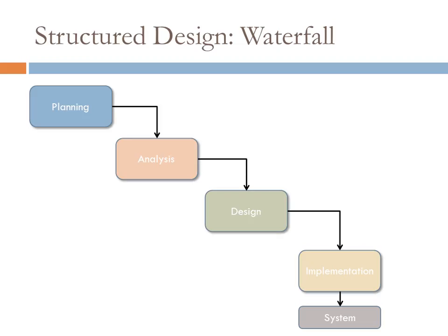And then once we're done with that and move to the analysis phase, we very rarely ever come back to this planning. Right? That's done, it's set in stone, and we move on. And the way that relates then to the project scope, which was mentioned earlier, is that typically they try to keep the project scope very fixed. Which means that it's fairly challenging, if anything changes along the way, to actually go back and implement new changes in the project scope.